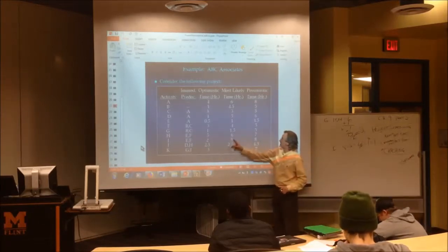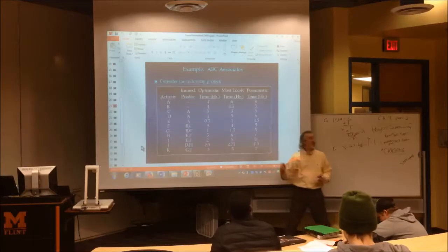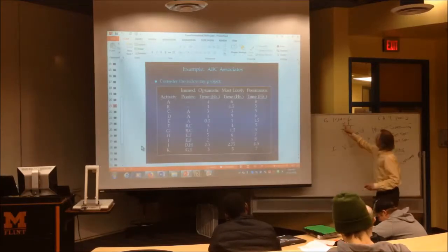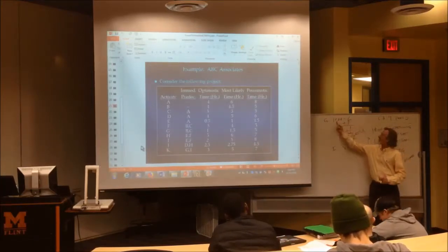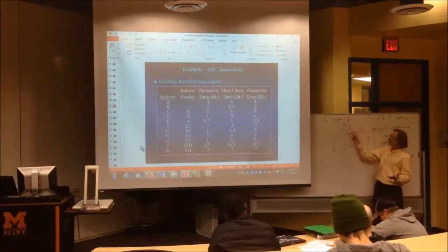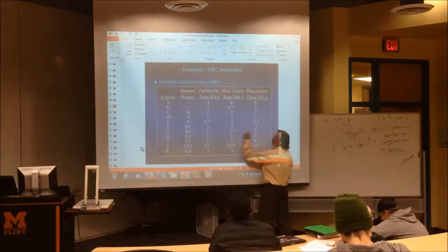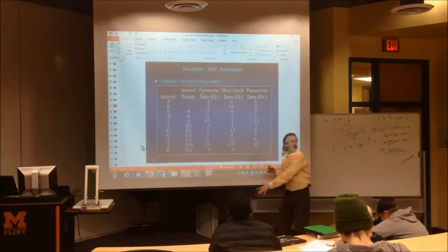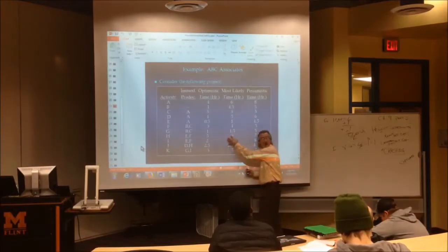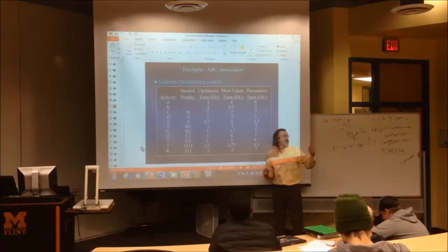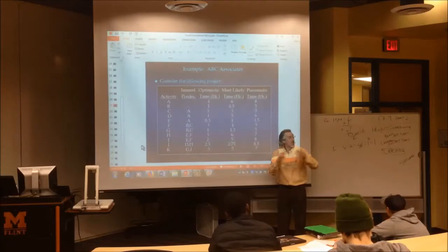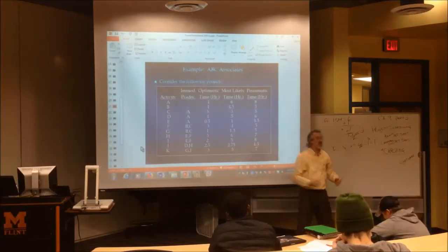Why the 6? Well, in this case, we're always using 6 numbers. 4 of them just happen to be the most likely, then our 5th number, and then our 6th number. So here, we used 4 of these, 1 of those, and 1 of those. And every time, you always use 4. You put 4 times the weight on the most likely number compared to the shortest and longest amount of time you can take.